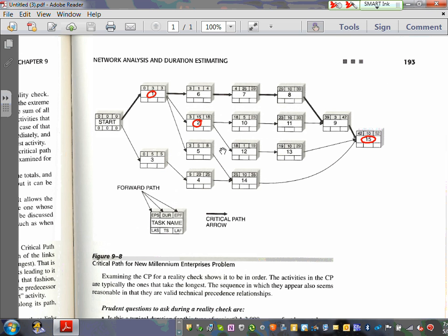The first number that they assign is called EPS. This number here, this activity, guys, right here. This is called the earliest possible start time for the activity, EPS. So activity number 1, Karen, is going to start at week 0 right away, Ryan. Then, Adam, the duration.